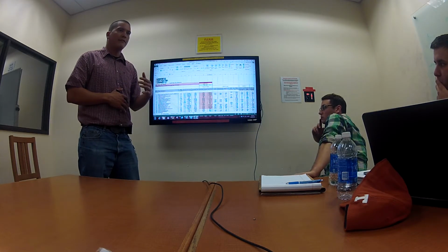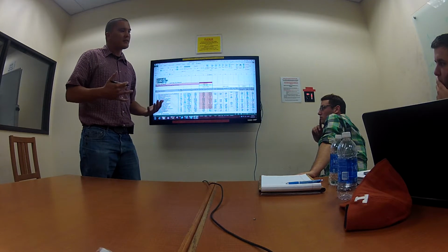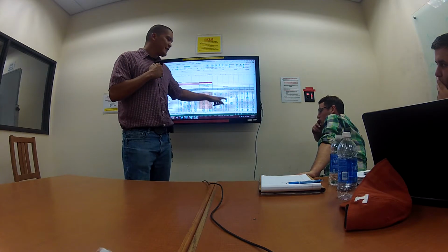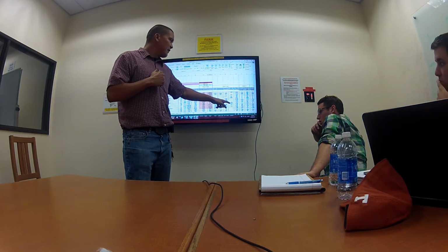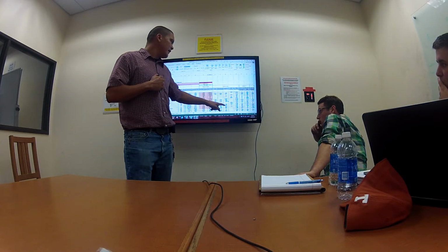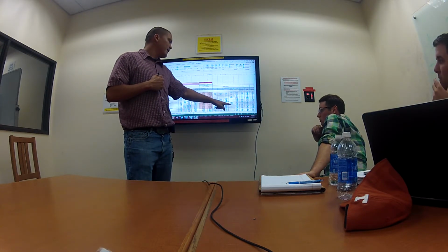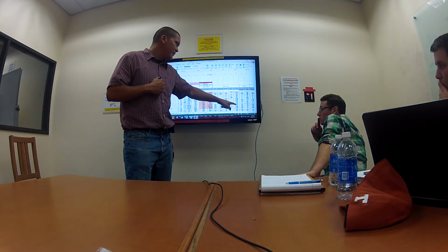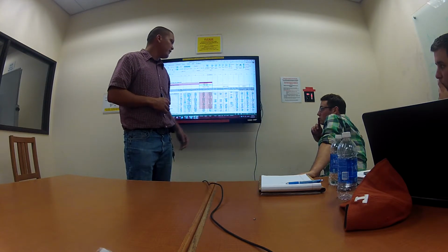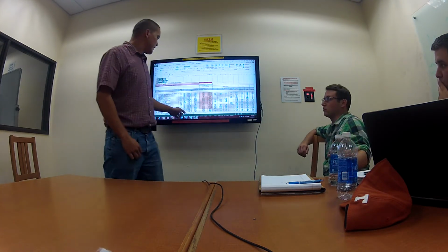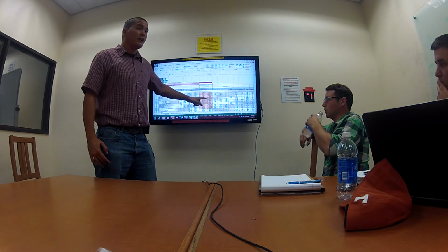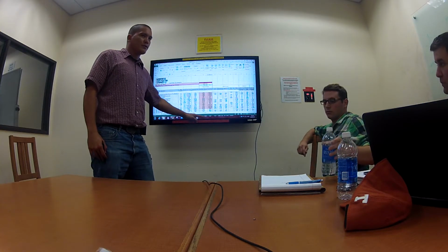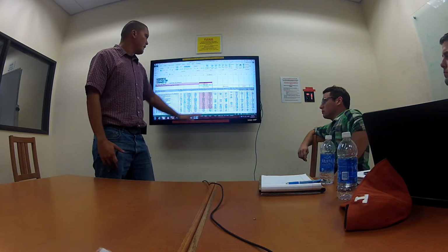We just want to leave a handful of them open to write in at the end in case we get last minute cuts, because they will be calling you all the way up to the last minute, giving you material cuts and sub numbers that totally eliminate a line in here. They'll say, I can do this for $6,000. You say, the total I have in there right now is 10,000. You make sure they have the whole scope covered, and boom, you put in 6,000. That cuts your number, and it might be something you already have closed out and locked in, but all that means is you need to reduce your numbers somewhere else that are still open. So that's what this column is.